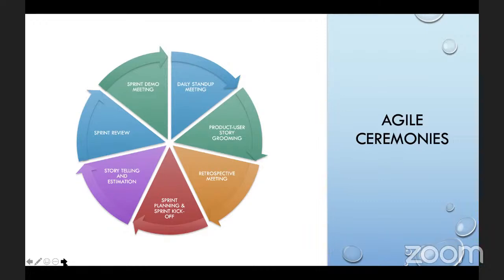all the things that we want to do, the tasks that we want to do. So when we add up all these story points, and then we get to the threshold that maybe 30, which is our sprint velocity, that's it. We cannot add any new story, and all the other stories will have to wait till we are done with this sprint. Then we'll begin to prioritize them again and then add them, because we've exceeded our threshold, our capacity, right? Our bandwidth. Okay, so that is it for storytelling estimation.